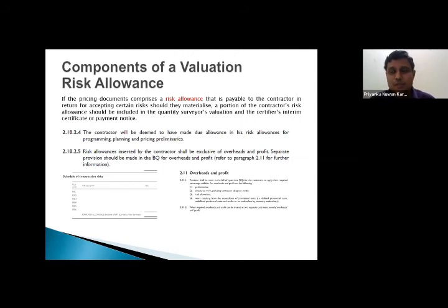Okay, then he puts the risk into that particular rate because he has some sort of a degree of uncertainty whether he can find a proper approved applicator. So he might have got 2-3 quotations from approved applicators, but he might have thought that the lowest one is not giving the proper delivery. He suspects that. So he puts that risk factor into account and then builds the rate with that particular risk amount.